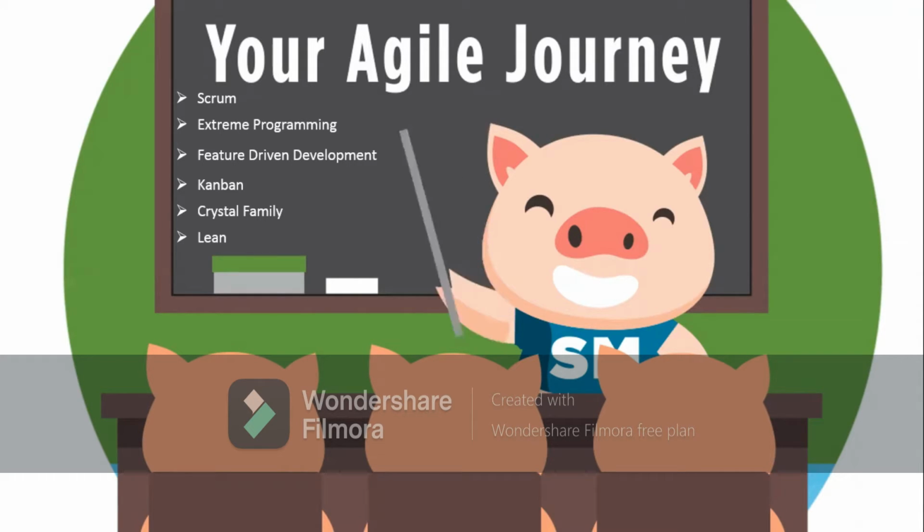It also has a daily meeting, which we sometimes call a stand-up meeting, of about 15 to 20 minutes, or at most 25 minutes on a daily basis, in order to know what the team has achieved and what obstacles they are having.